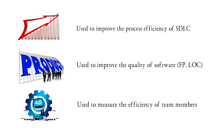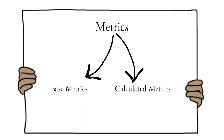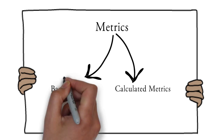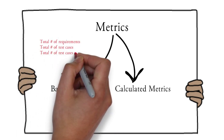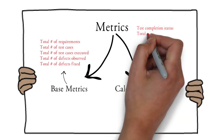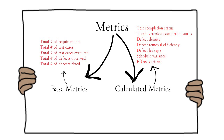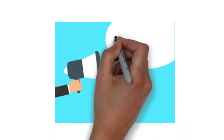Project metrics are divided into base metrics and calculated metrics. Base metrics are readily available data — for example, total number of requirements, total number of test cases, number of test cases executed, or total number of defects raised. In calculated metrics, we derive new data from base metrics — for example, test completion status, defect density, and defect removal efficiency.